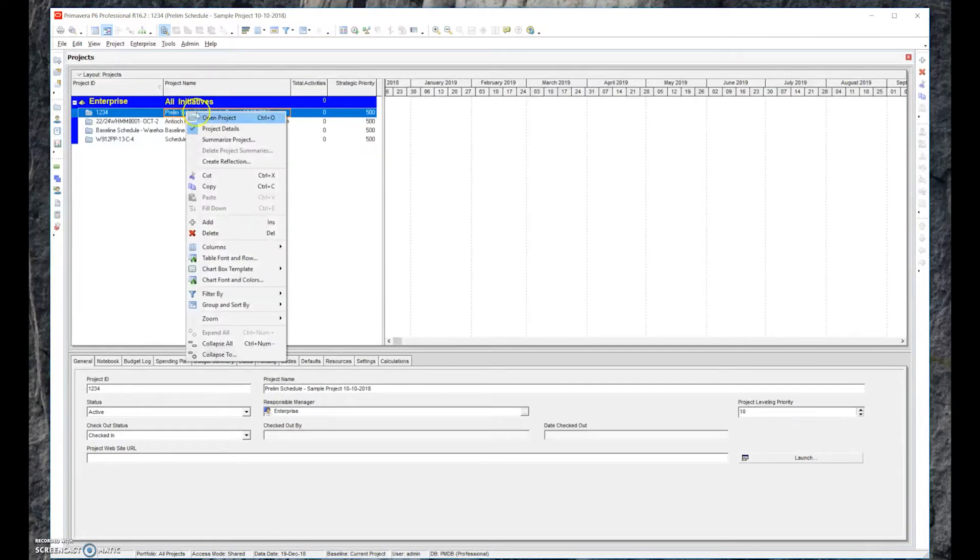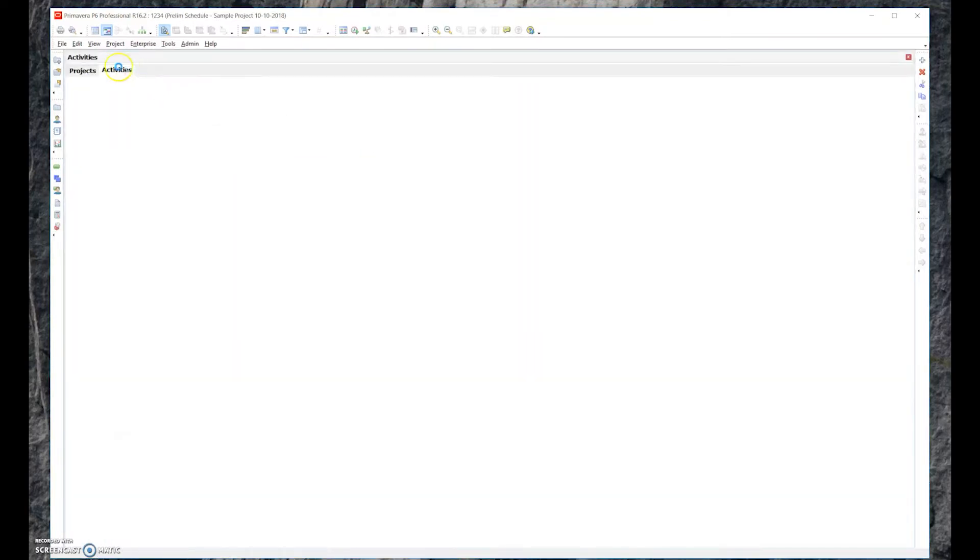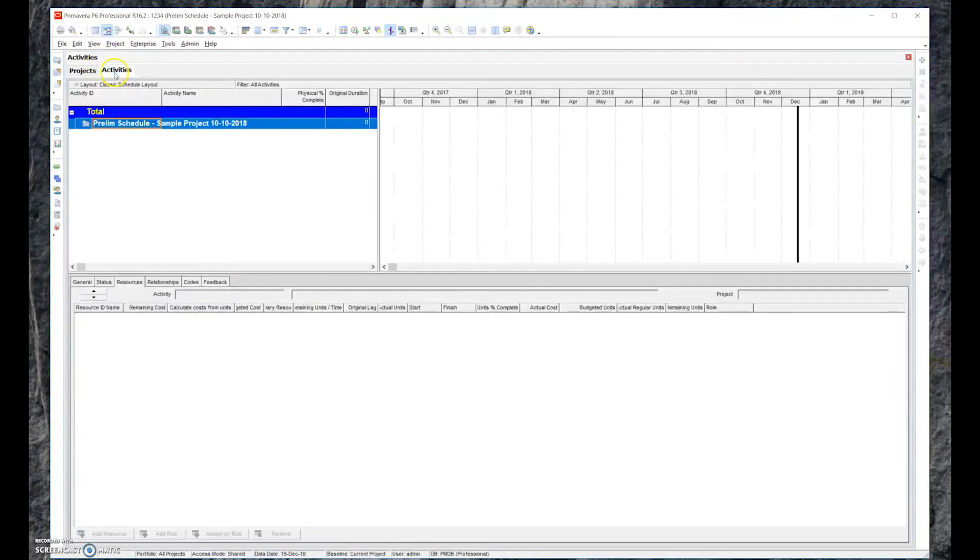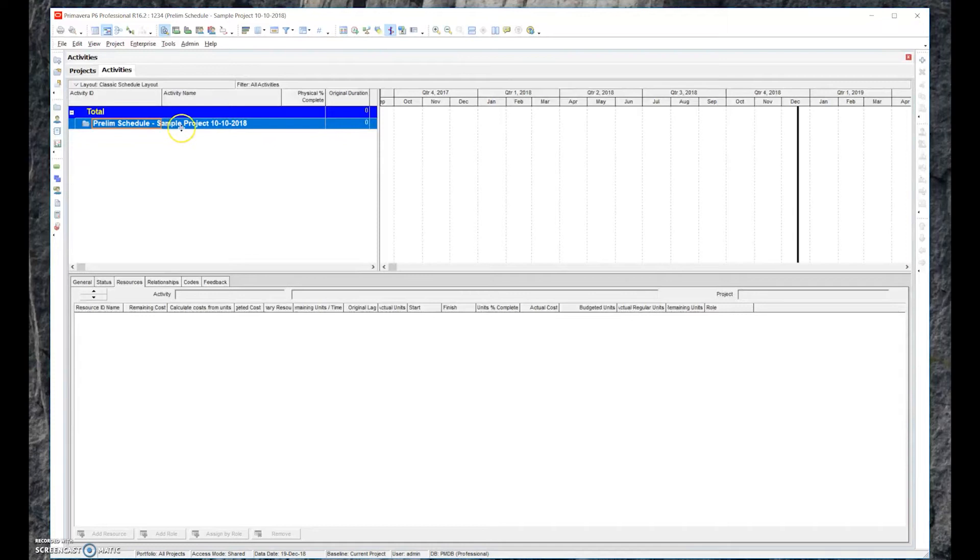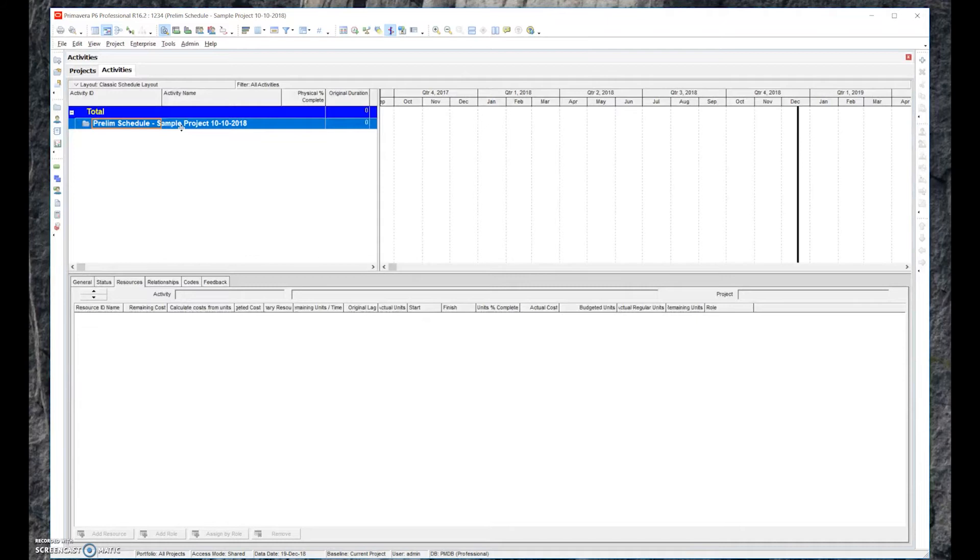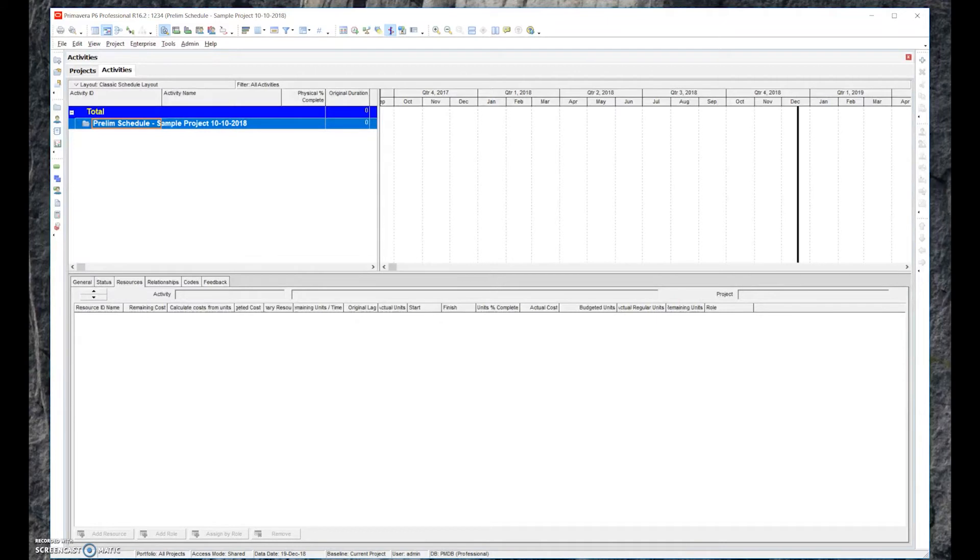We're going to go ahead and open this up. We right-click and hit Open Project, and it's going to open another tab. The other tab's called Activities. This is where the detail project view will be. We named it Preliminary Schedule right now, but we're going to change the names as we go through the process. We go from Preliminary to Proposed for Review, Submitted for Approval, Approved Baseline, and Schedule Update. So the naming structure of it will be different as we progress through the process. We'll change the name.